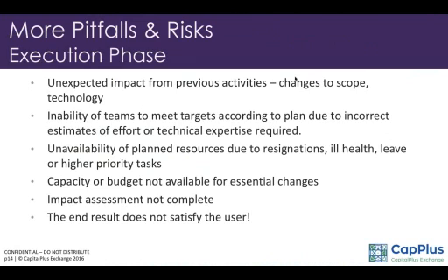One of the other things is that teams, especially users and other teams that you did put down, don't meet target dates. And probably they have made incorrect estimates of the effort that has to go in, and also the technical expertise required. So you need to sit down and plan. You need to think through. Like, for instance, I'll give you an example like data migration. Everybody thinks that data migration is really easy. It's not. You need to make a decision in terms of what data should be migrated, what is the history that has to be migrated.